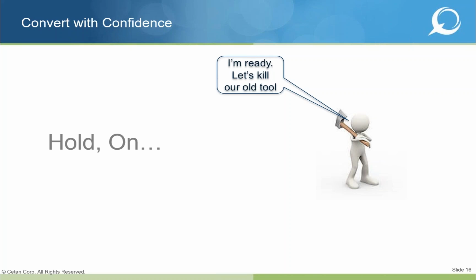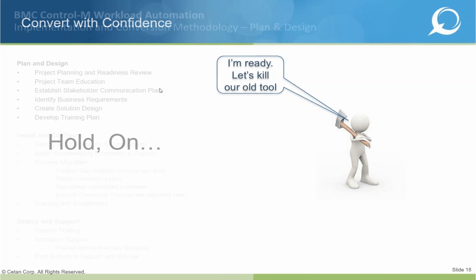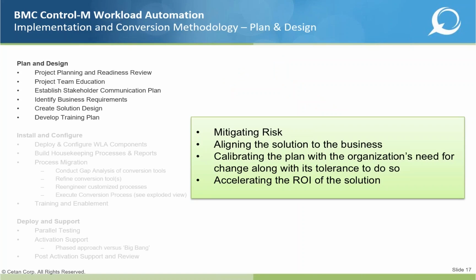But once we know the information, then it's a matter of putting that information together on a timeline and then also breaking it out at a macro level, in an estimate level. And you can see on the slide that we have now, the spreadsheet actually is aligned along our methodology, so that way you know for each stage, for each phase, how many days we think the activity is actually going to take. And there is no standard answer. It's truly dependent on your environment. It's truly dependent on the number of things you have defined, the number of platforms you're running workload on, how many people you have that need to be trained.